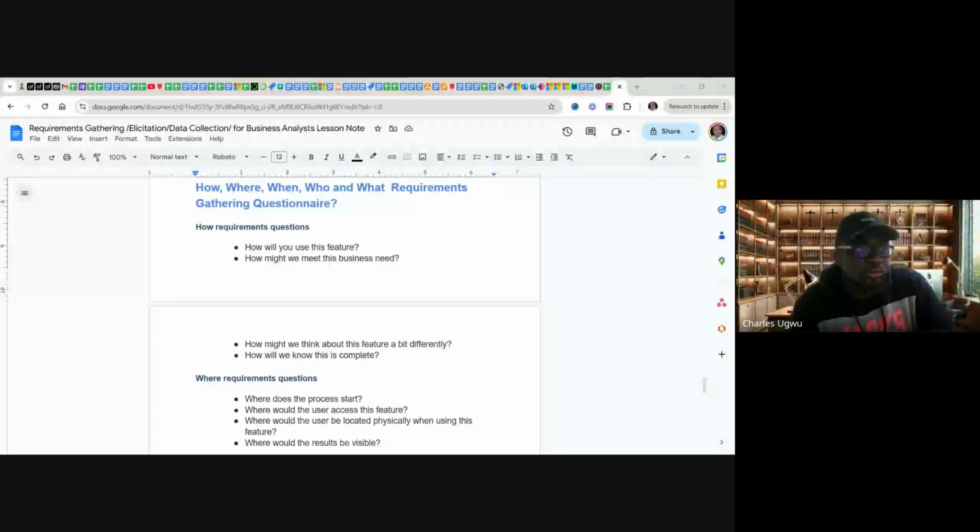No, what I mean is when you finish your work, you need validation. Validation means that I have a meeting with you and I was talking, you are writing, and after writing, you don't just go and start implementing, you need to bring it back, just like taking the minutes of the meeting. After the minutes of the meeting, you need to send the minutes to all the people who attended the meeting to make sure that what you captured in the meeting is what we agreed on. That is the purpose of taking notes.